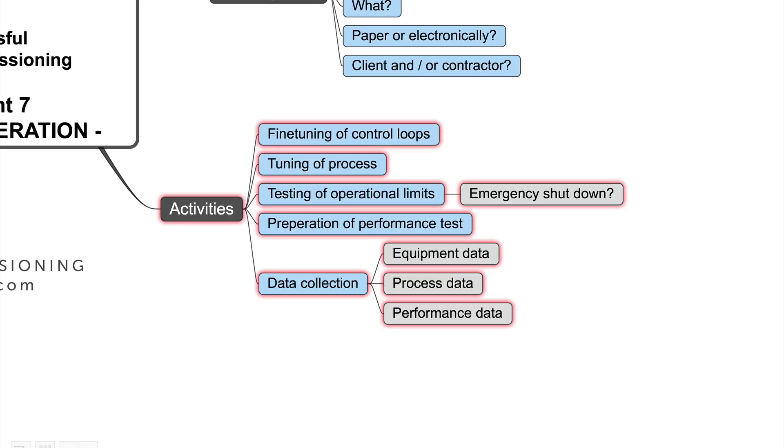We will do everything to prepare for the next step for the performance test. We collect important data, data about the equipment, all important and relevant process data, and as well performance data. As I told, we need to prepare the performance test. And the initial operation is the phase to prepare everything for a successful performance test run.